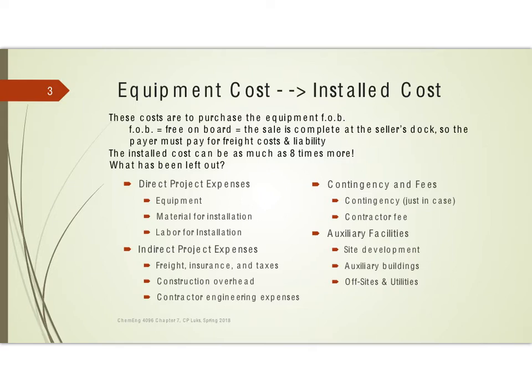We also need to think about what else goes into installing equipment. There are going to be some direct project expenses, which include the equipment but also any other material you need for installation and the labor for installation. But there are also some indirect project expenses: that freight charge, the insurance charge, and sales tax.